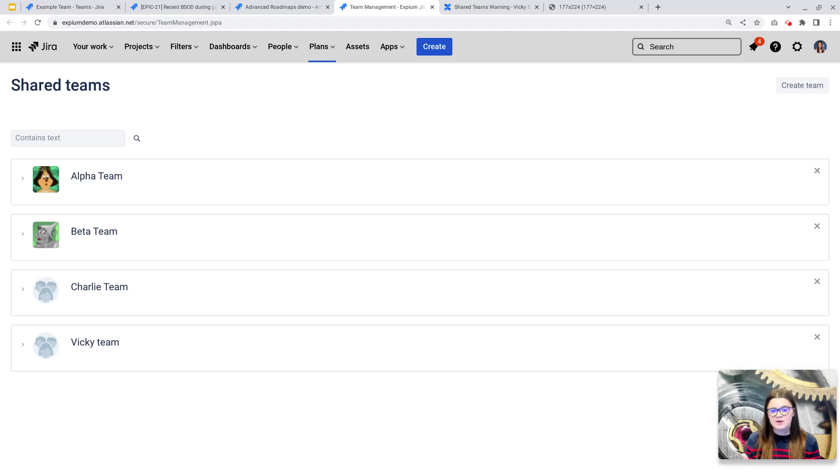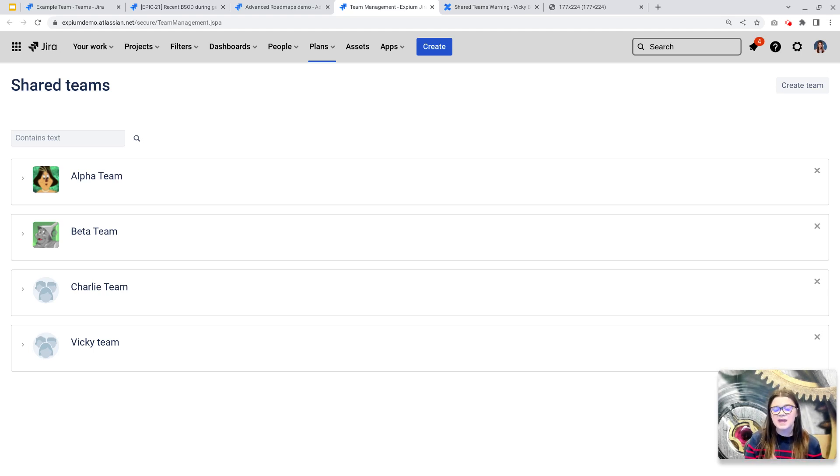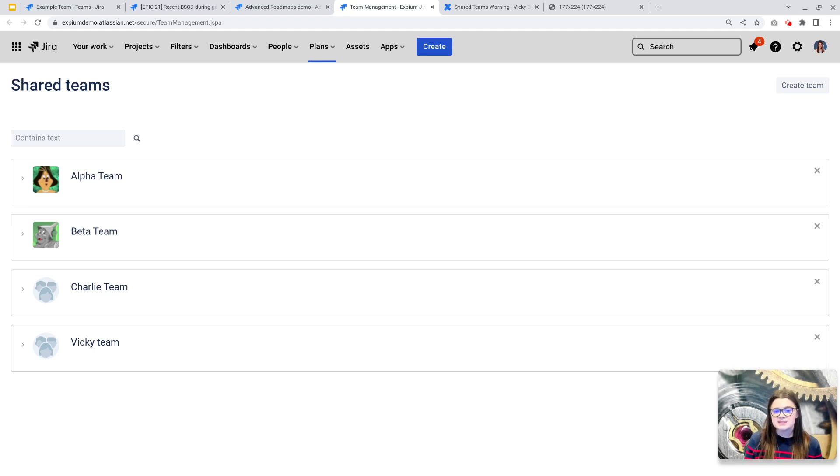If you have existing shared teams like you see here, you will be required to add a new team member to them if you update any of their details. And if you do not add a team member in, then a default team member will be assigned.